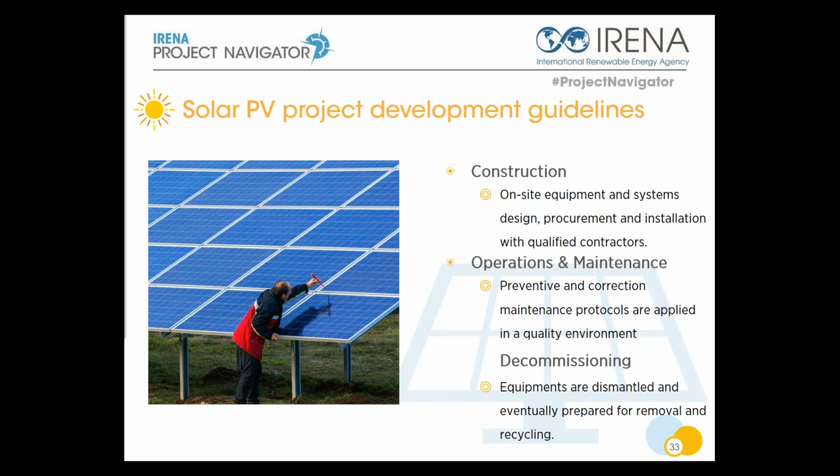As I explained, we look at permitting, so the different permitting processes by international or multilateral organizations, World Bank, EIB, and so on. You can find all the links and information in the guidelines. And we also provide guidance to obtain permits like the land use permit, building permit, grid connection permit, or operation license. So at the end, I will close on this very important topic.